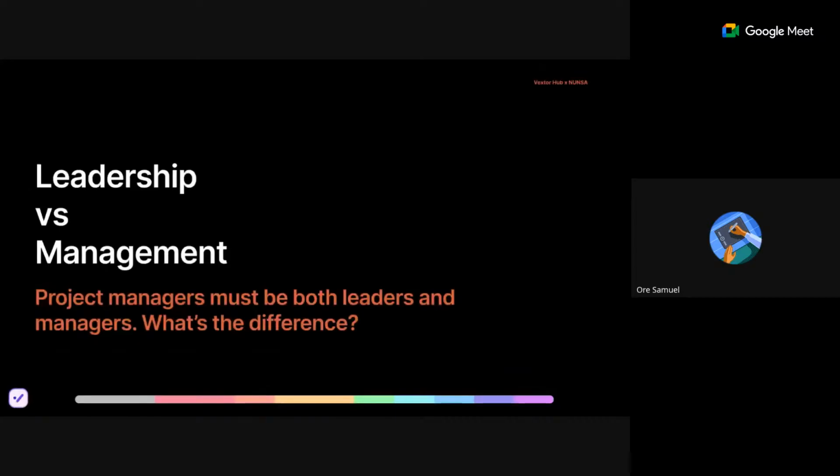So that's why, as a project manager, I said yesterday that going along with your team members is very, very important, right? Because if you are not carried along, so many people can disappoint you. Like there's a question someone asked in the group about having a backup. When I talked about risk assessments yesterday, I said you should always have a backup for each task, or for each vendor. And the person also gave an example of a caterer.